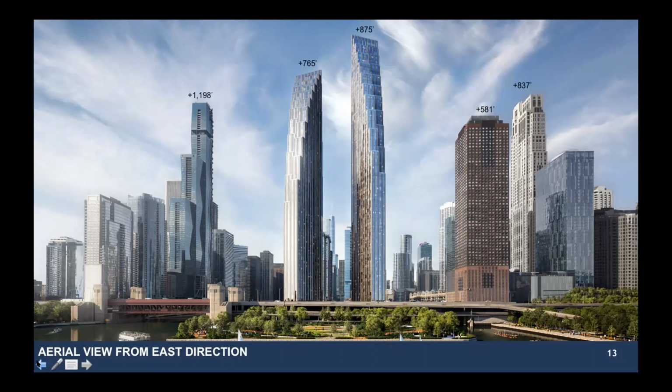Conducting this updated mid-phase traffic study with fresh vehicular counts between these 2 phases of construction, CDOT staff and my office will have the accurate traffic data that we need to reflect on how the new tower is impacting the area. This will give the city valuable insight regarding the added density and vehicular activity generated by Tower 1 and allow us to make adjustments, if necessary, to East-North Water Street. If warranted by the study, TNP vehicles could be restricted on where they pick up and drop off. Should the study determine further infrastructure upgrades or improvements are warranted, the applicant would be responsible for funding those upgrades or improvements prior to receiving Part 2 approval for the Phase 2 tower.